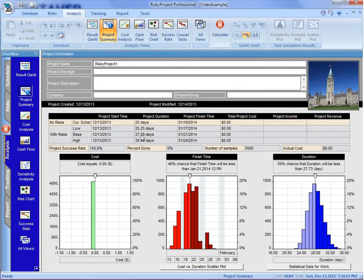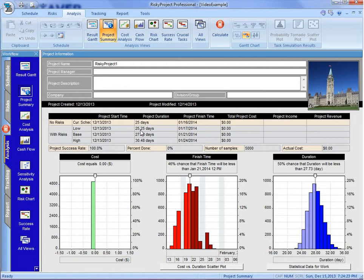The P50, or the average, is 27 and a half days. Our optimistic, P10, which is the 10th percentile, we have a 10 percent chance of meeting this, is 25 and a quarter days.